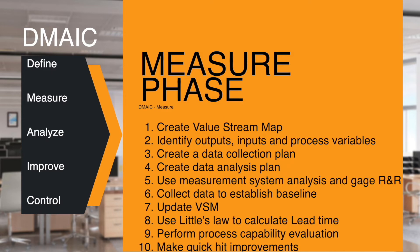Eighth, use Little's Law to calculate lead time. Ninth, perform a process capability evaluation. Here, you will compare the actual variation in the process to the allowed variation in the process — voice of the process versus voice of the customer.